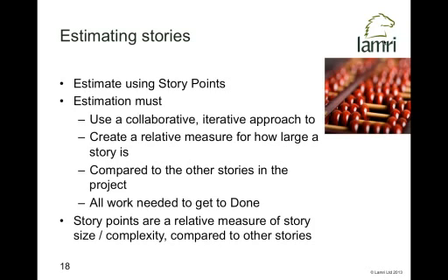But the essence is, you give your team a set of cards. The cards just have numbers on them, and they're based on a Fibonacci series, which basically means they're close together lower down, and then the numbers get more and more spaced apart as they get bigger. So you start 0, 1, 2, 3, 5, then 8, 13, 21, 34, 50, 55, etc. The idea is that as you get to the bigger numbers, you've clearly got more and more uncertainty creeping in. So you start to say, well, do I really mean it's double the previous story, really?